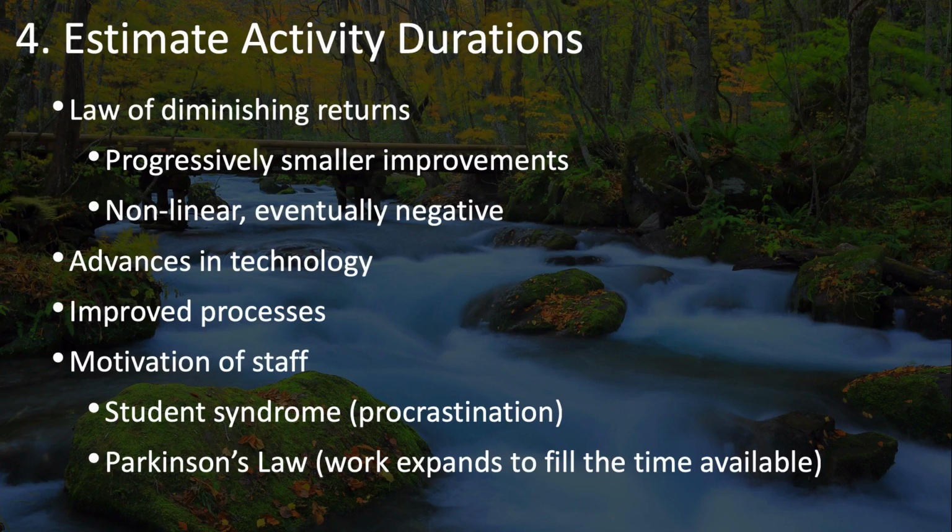Eventually, in fact, not only are the results nonlinear, but eventually they're negative, meaning that adding more people or resources to a task can actually make it take longer. Why would it make it take longer? Well, because you have so much more overhead when it comes to communication among team members, and because new team members need to be trained up and brought up to speed on the work that's being done. There are a lot of reasons why the law of diminishing returns applies when you try to compress activity durations.